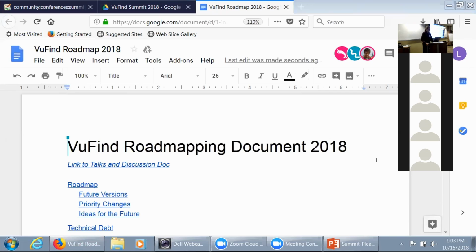All right, so I am going to go ahead and get started. Last year we did road mapping in sort of a new way. We had a Google document and we talked through the issues and made a list, and then we moved the items from that list into the projects tab of our GitHub so that we could keep track of our progress. I think that actually worked quite well, so I'm hoping we can repeat that process this year.